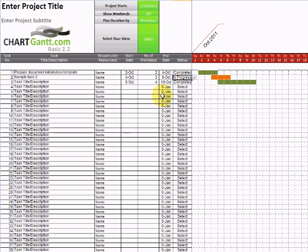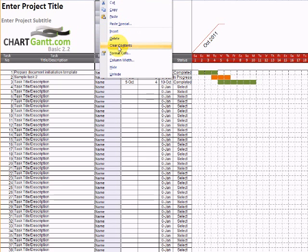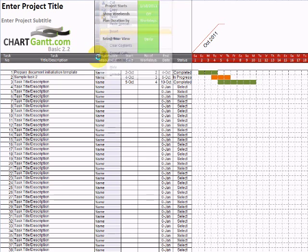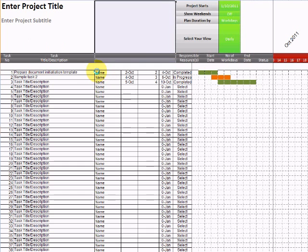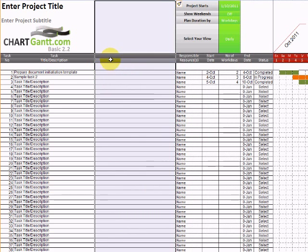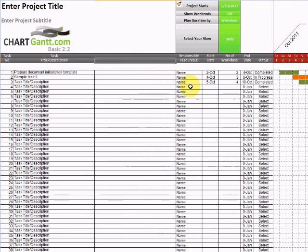However, one of the beauties of using ChartGantt in Excel is the ability to create your own status indicators. So let's create a new status column which might relate, say, to issues associated with our project.